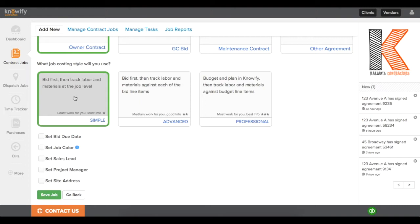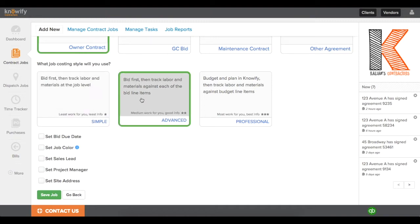In simple mode, the first step will be creating your contract and quoting prices to the client. Then when you track costs, they'll just be to the job itself. In advanced, you also start by creating the contract and sending it to the client, but you'll track your costs to each of the line items that you quoted to the client in the contract.